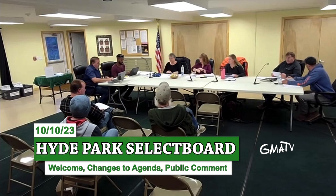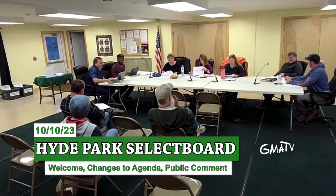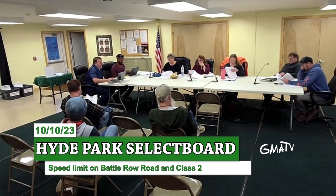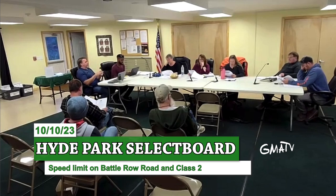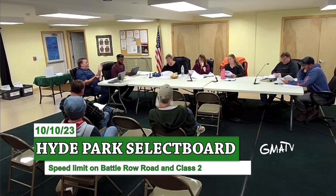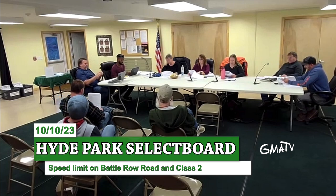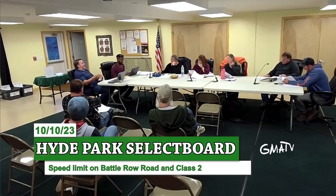Speed limit changes are listed, and we have, I think, two choices. You have a list of roads that are identified for changes up or down. Every change under state law is supposed to have a traffic engineering study, which supports the change, or at least gives a thorough evaluation of that road segment. It covers speed limit, traffic volume, number of driveway cuts, paved or gravel, corners, all these little factors about the road, and that results in a traffic engineering study. That study is not done for all of the roads. There's three of them. I was trying to time it, maybe half an hour for each one, if you have the data.